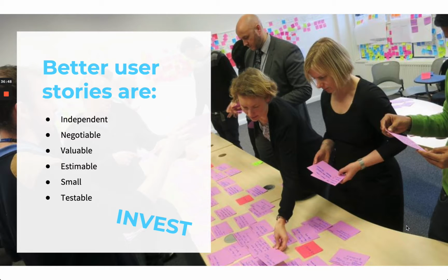And also something that we always say is that large stories usually tend to produce big waste. Because when your story is very big, you spend a lot of time on it. The context is shared between multiple people, and people might have to remember things from the very beginning again, and things change. I've been part of one team where one story took like 2 months, and then they had to really throw everything away and start again by breaking that into smaller stories. So be careful with the amount of waste that can sometimes be associated with very big stories.